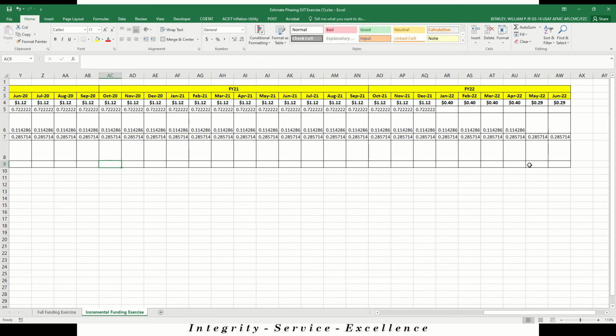This becomes more relevant when we have a continuing resolution or other situation where funding availability at the beginning of the fiscal year is at risk of being handed down to us for various reasons. So when we lay this into our monthly estimate, it's important to put it in a conservative manner, saying that we don't have any additional information, so we want to assume it happens in October.